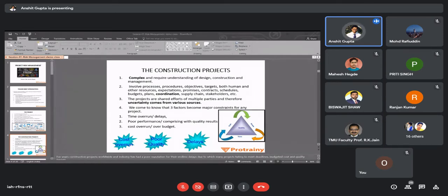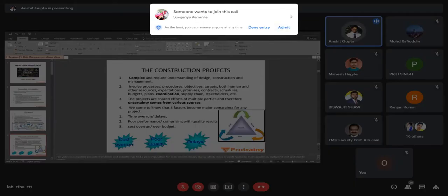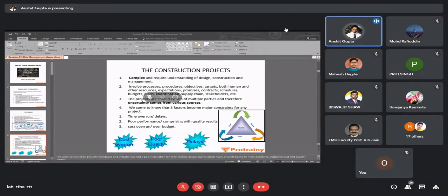But all risks are not bad risks. Risks are generally viewed as positive risks, which are opportunities for a project that we want to extract and utilize; negative risks, which are threats to our project; and neutral risks, which do not have any impact on the project. There are three kinds of risk when we talk about risk management. Also, risk is not static. That is why you need to prepare the risk register, or update the risk score table, every 10 days, every 15 days, or at least every month, because risk is not static.